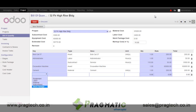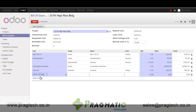Now we come to a completely different paradigm of project management: using the WBS and work packages, arriving at cost codes at the last level of your Work Breakdown Structure. Here we select a work package. If that is the approach, then the direct cost part of the 4M method can be avoided and we can directly start working with the work package.